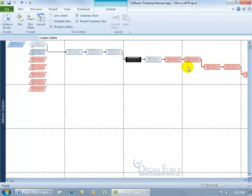And it's marked in red, each task that's critical. If you delay one, it knocks the next one out and that one's critical, so it's going to knock the next one out. It's like a domino effect until it pushes out the project's finish date, in which case we're no longer finishing on time.